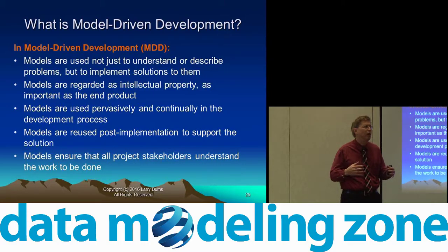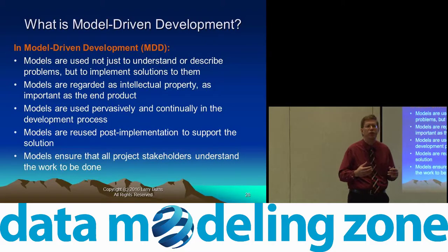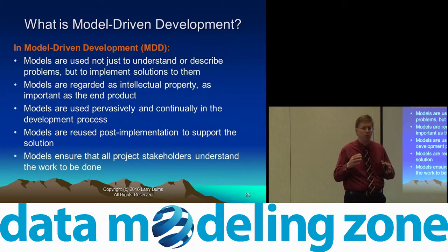At that point, you need to kind of drop back and punt. You need to go back, even if it costs you a sprint, and re-examine your application architecture and design and create application classes that aren't tightly coupled. And then taking the time to do that necessary work will make all of your future sprints more agile. You'll be able to deliver higher quality work, higher valued work more quickly. So sometimes the most agile thing you can do is to stop for a minute and think about what you're doing and maybe go back and rework something that's impeding your progress.